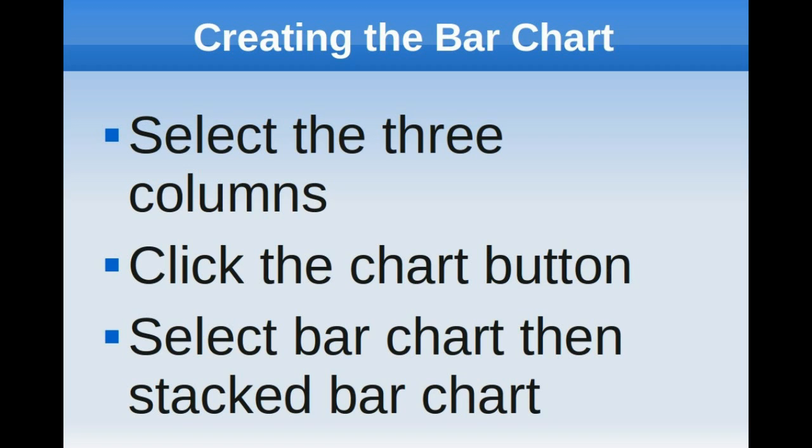Next, you want to create your bar chart, so select the three columns, click the chart button, and then select bar chart, and stacked bar chart as the bar chart type.